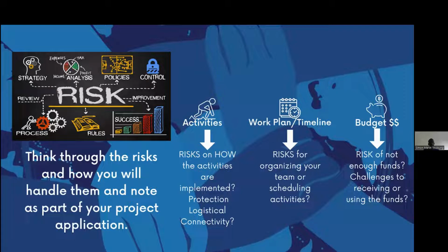Are there also risks in terms of the budget, maybe not having enough funds, or a challenge receiving or using funds? Maybe it's hard for you to receive funds in your own country. Like some projects we worked on last year, it was very hard for us to transfer the funds. It would take maybe 3 to 5 days for them to sort some of these things out.